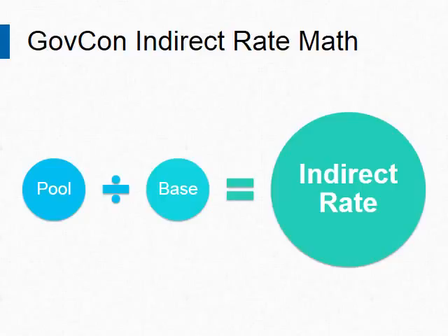You also want to keep in mind that the indirect rates that you're submitting to the government as your actuals for the year, that's going to have an impact on your contract cost. If you overran your indirect rate significantly, your program managers are going to be really upset. The reason they're upset is because money they had set aside to pay these two guys to finish that little task has just been sucked up by that indirect rate variance. And of course, they always look to the accounting department and say, it's your fault. Well, the accounting department didn't spend the money.